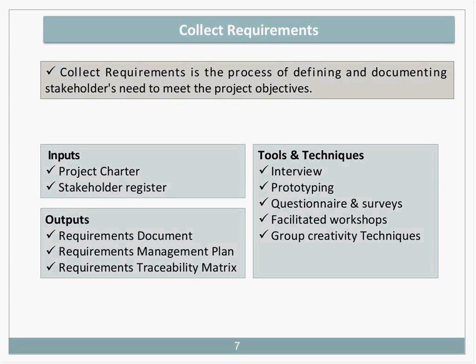Interview stakeholders to obtain and verify the requirements and expectations. Build a prototype of the product to assist the customer in defining their requirements. They can see, touch and feel a prototype, and lots of times they can identify the requirements much more clearly. Another one is questionnaires and surveys, for instance, to obtain requirements from a large number of stakeholders. This can be followed up with a statistical analysis of the requirements and verification or clarification by means of interviews. Stakeholders can also be brought together in facilitated workshops to define the requirements and, importantly, to resolve any differences or conflicting requirements.